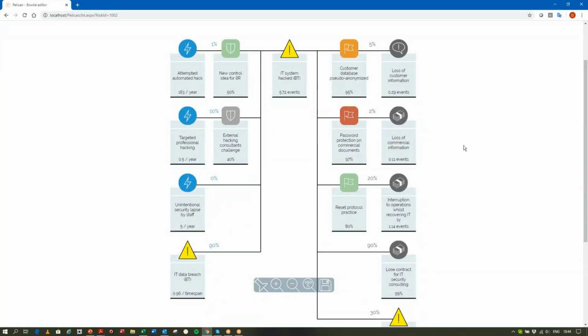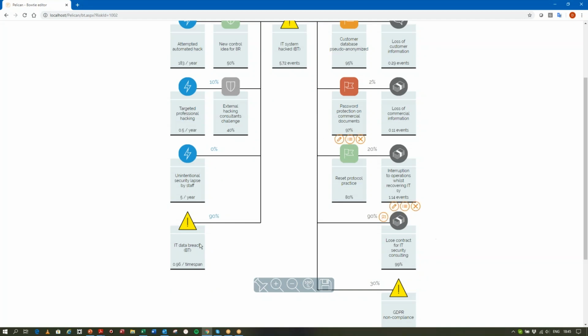And this will show a typical bow tie structure. On the left-hand side, we have the drivers, which might cause the risk to occur, the risk event itself, and the different consequences. Here we have reputational consequence, financial, two more financials. And you'll notice that a risk is already a driver to the second risk, and this risk here is a driver for a third one.